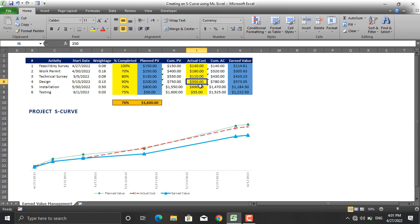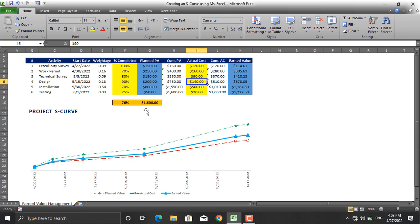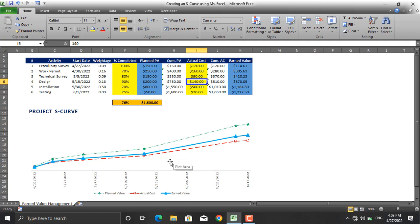I'll decrease the rest of the values and we'll get back to you. I have decreased the actual costs to less than the planned values, so now as you can see the actual costs are lower than the earned value and planned value, which means that the project is relatively in a better condition than it was before.